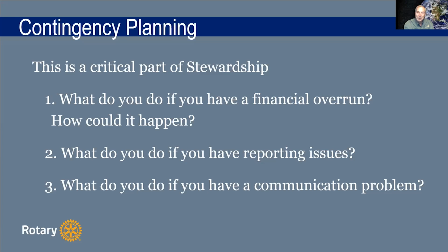You're still doing what the project wanted to do. You just have to plan that if you start to have a financial overrun, then this is the way you would adjust your project. It can happen very easily, right? The exchange rate changes, and when the exchange rate changes, then everything looks more expensive or less.